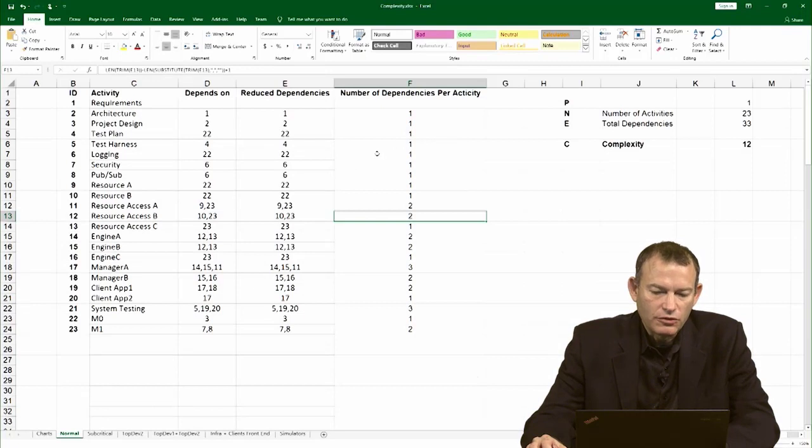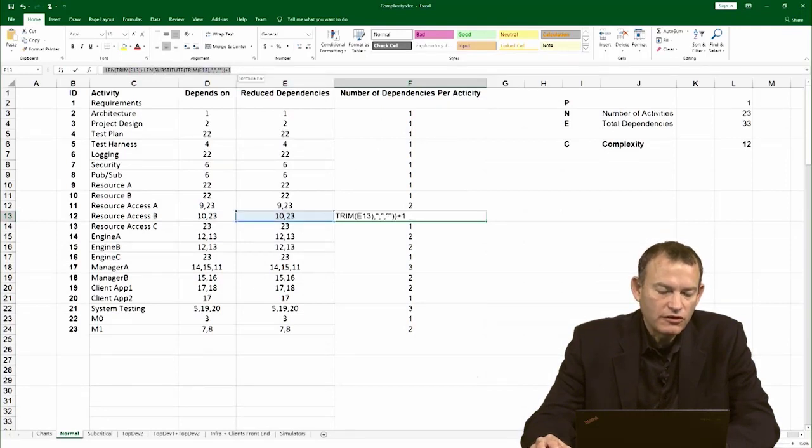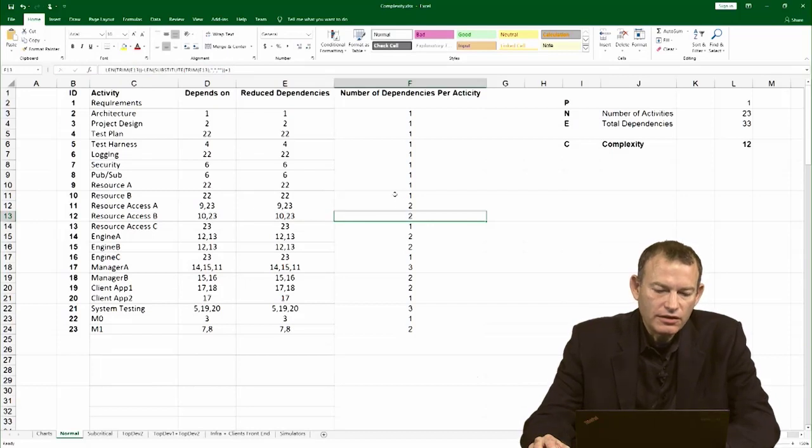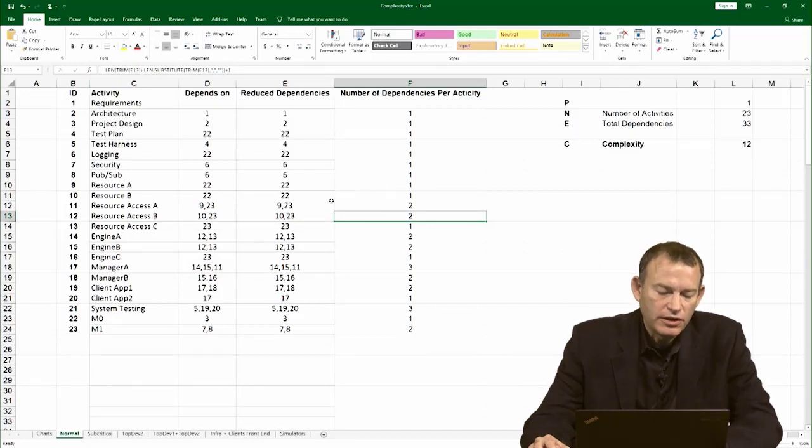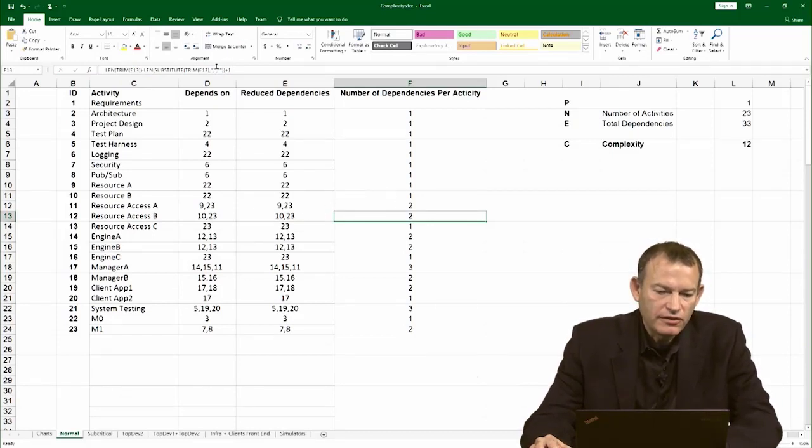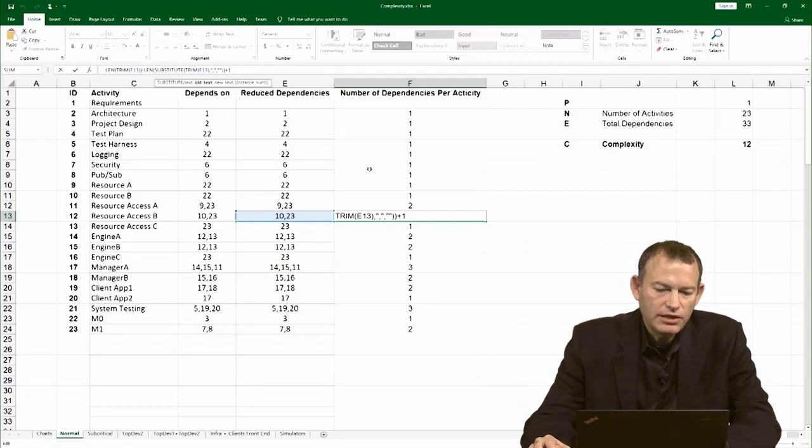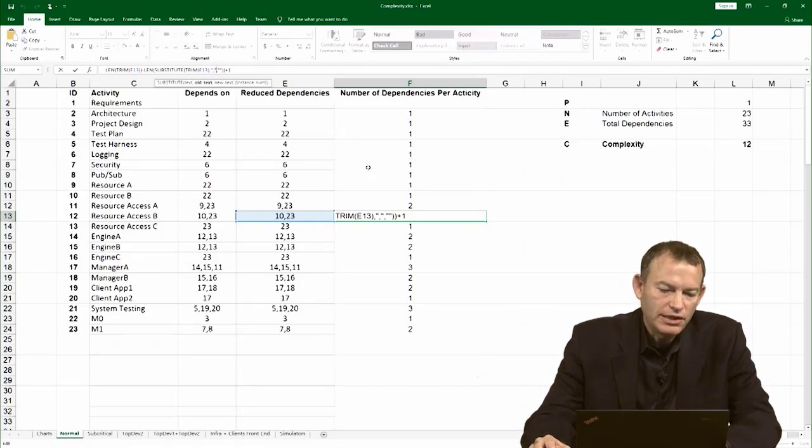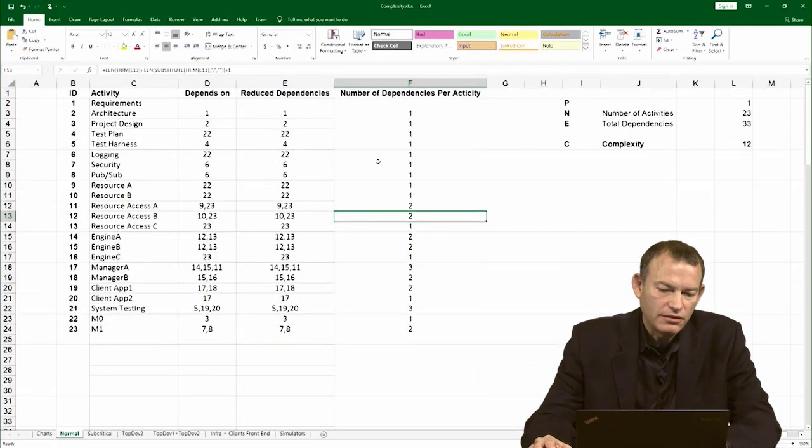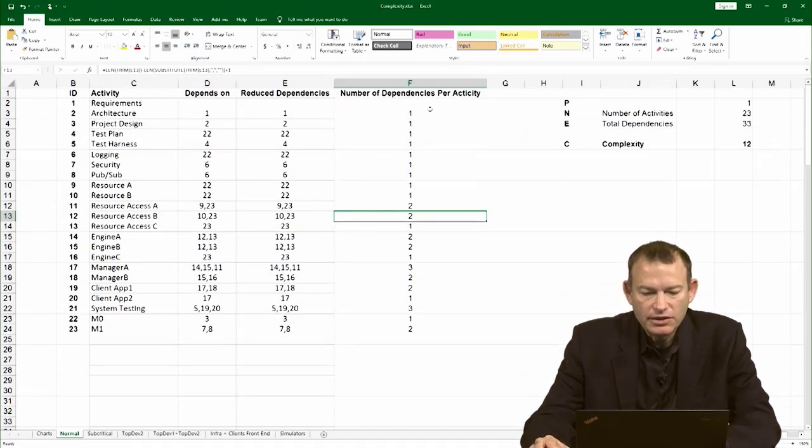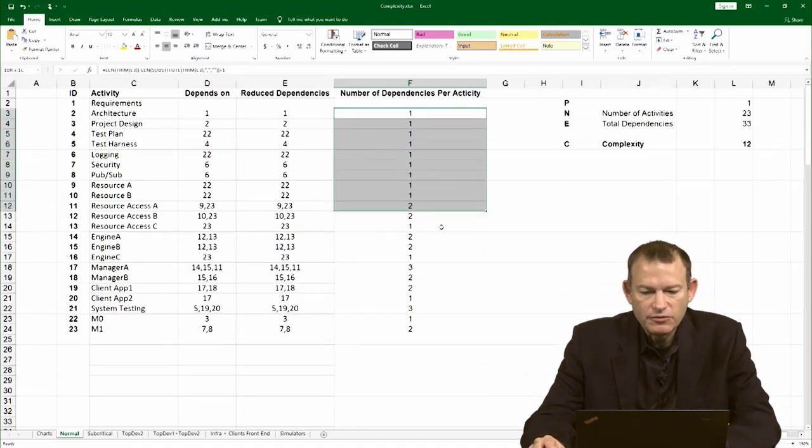So, it's a good idea to automate it. What you could do is use this expression in Excel. What this Excel expression is doing, it actually parses the cell to the left and counts how many comma-delimited elements there are. And as a result, it can actually calculate how many activities we have. And that's basically what this formula is doing.